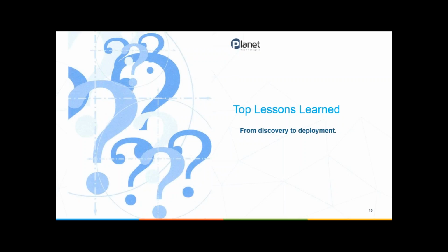Thanks. Now, another piece that I always like to have, being an old school sysadmin, is how are we going to roll back? Whether it's an individual user or an entire iteration, what do we need to roll back from Windows 10 to Windows 7 or Windows 8 or 8.1 or whatever OS you're going back to, and still preserve that data? So you need to ensure that you have some sort of rollback plan, contingency in place, and tested and proofed, and ensuring that it does work.